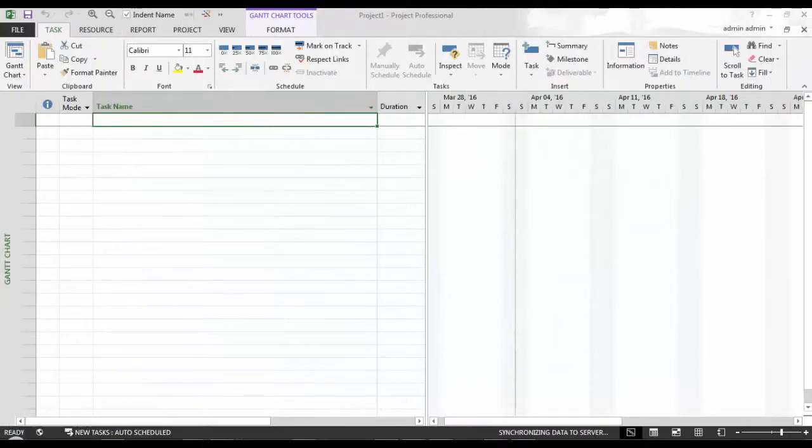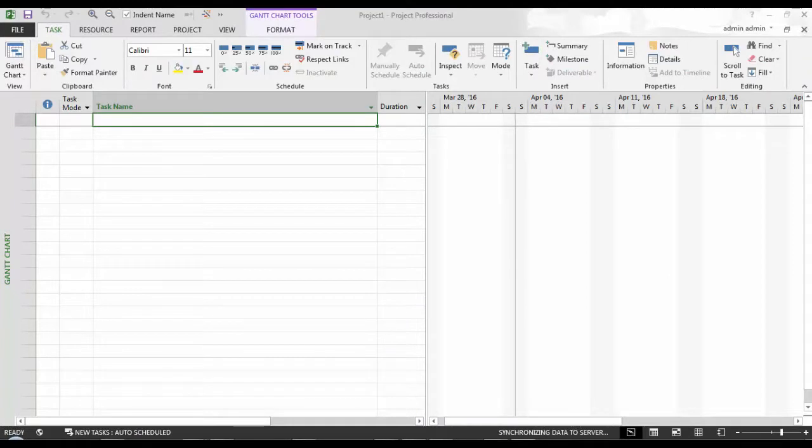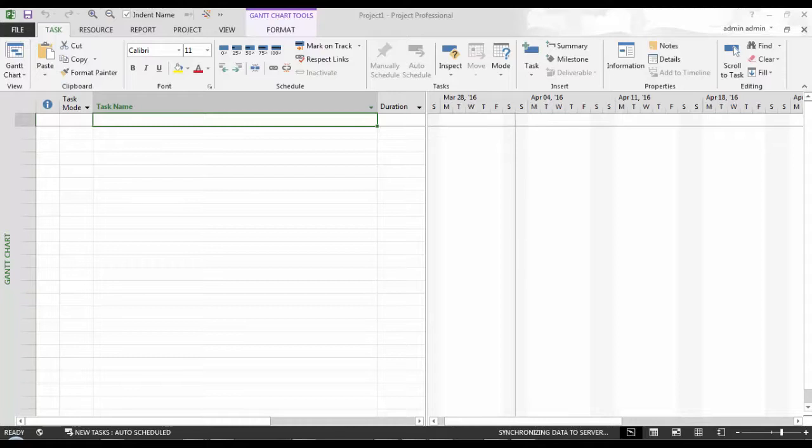I will assume that you are already familiar with Microsoft's project ability to create default finish to start dependencies within an existing project file. So, how would one go about creating dependencies between files? It's not that different except that we will need to have the project files open in read-write mode first in Microsoft Project Professional and insert it as subprojects in a single file acting as a shell or master project file.